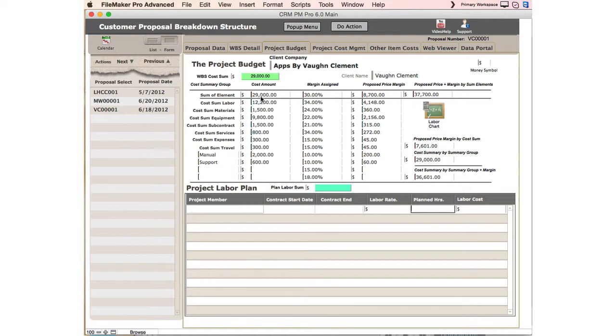You need to cover your labor as far as your cost for labor. And in this case, there's 12,002. You need to come up with 12,002 worth of labor and show how you're going to distribute it. This is not gospel. What this basically means is that you're trying to cover the labor to see how it's dispersed. Now, if you're going to use some other kind of application like Project or something like that to do the minute hammocks and packets and all that kind of stuff and lead and lag, you're welcome to do that. But this is just the way to rough out your cost, rough out your price, come down and show your labor as to where you think it's going to be.